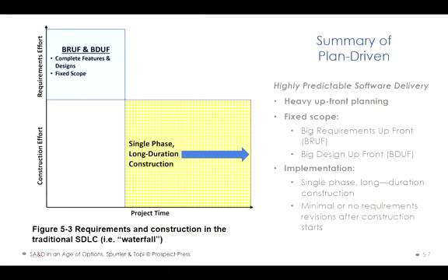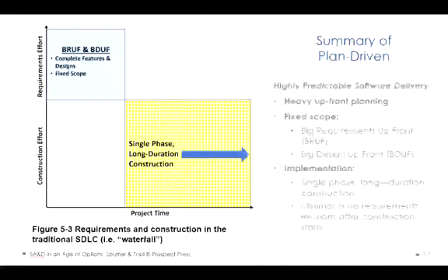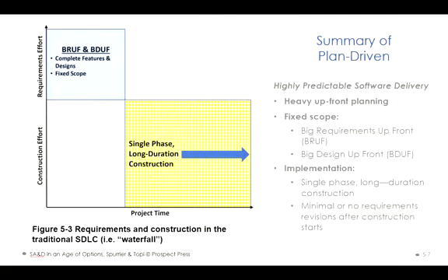Say, for example, in today's environment, if you are building a visibility website, meaning that you are just showing your company on the web and letting people know about your company, that type of project is very stable, very typical, and you can have big requirements upfront and big design upfront as well. Going through a very simple, straightforward step-by-step process fits very well to a plan-driven project.